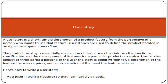The agile framework means we develop software using an iterative approach — not developing the project in one go, but on an iteration basis. In the first iteration we deliver five tasks, in the second iteration the next five tasks, and so on. The product backlog, which is essentially a scope document containing all customer requirements, is a collection of user stories. A user story is a functional requirement that informs the functional specification and development of features for a product or service. User stories consist of three parts: a persona of the user the story is written for, a description of the feature required, and an explanation of the need for that feature.